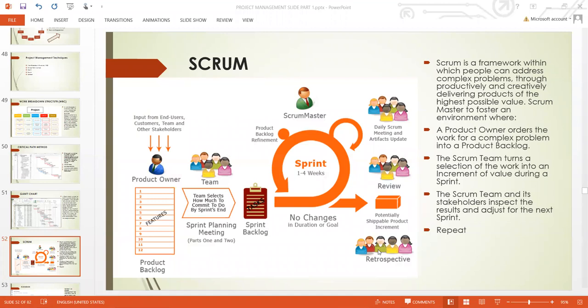Features will come in. The customer should be able to put the product in the shopping cart. That product you have to break down into user stories. User stories are what this shopping cart needs to do, like the customer needs to be able to put the product into the shopping cart. And if the customer changes his mind and doesn't want to buy, the customer can click delete and he will delete the product from the shopping cart. So these small features the shopping cart has are what we call user stories.